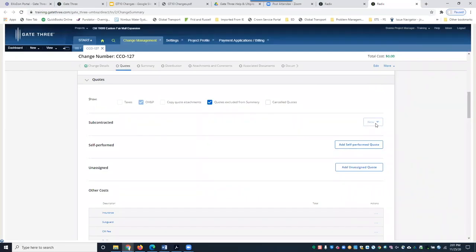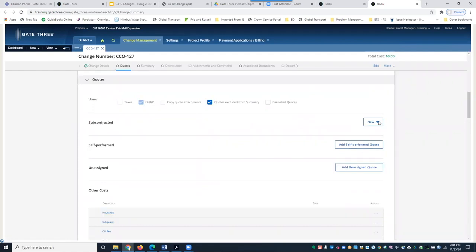If you ever see something grayed out or unclickable, get into the habit of going to More and clicking Refresh. Once refreshed, click New and you'll see two options: Request a Quote, which is when you want to send a quote request out of Gate 3 to a subcontractor; and Add a Subcontracted Quote, which is when you already have the quote and just need to log it. We're going to do Request a Quote first.